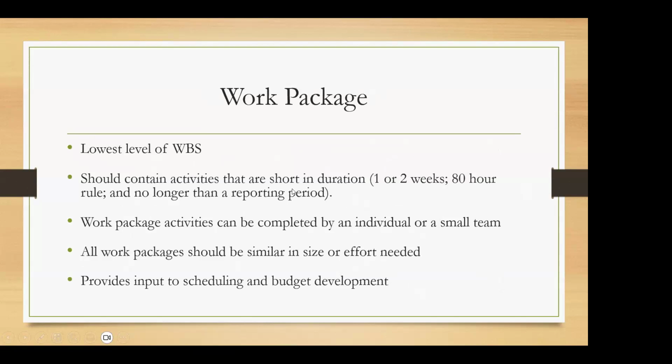So what is this work package? A work package is the lowest level of the WBS, and it will contain activities of a very short duration. Usually it is work that can be completed within 1 or 2 weeks. In certain cases, they have an 80-hour rule, so they will only include work that can be completed within 80 hours in one work package.